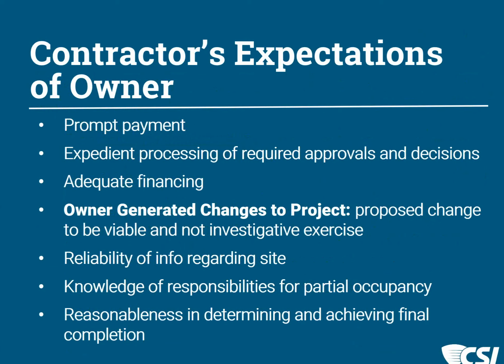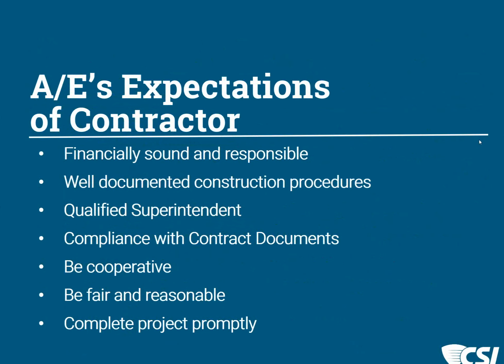And that there's some reasonable end to the job, that there's reasonableness involved in determining a final completion date. Can the owner use this project for the purpose for which it was intended? And if they can, then they should be given the final completion date, and that's one of the expectations that they would have.